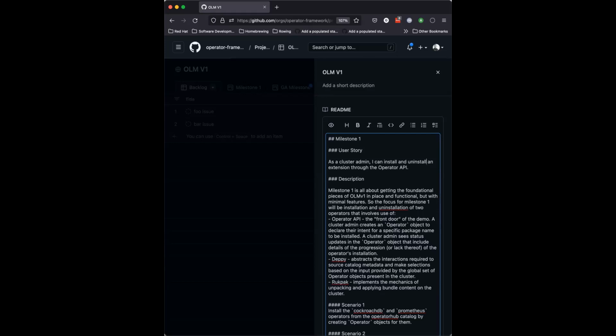It seems like creating a generic issue that captures a milestone 2 proposal, so that people can make proposals in terms of the user experiences that should be completed as part of milestone 2, might be a good way to allow people to give feedback and outline what they think should be in the next milestone, but doesn't cause us to populate a backlog that could become stale if we pivot.